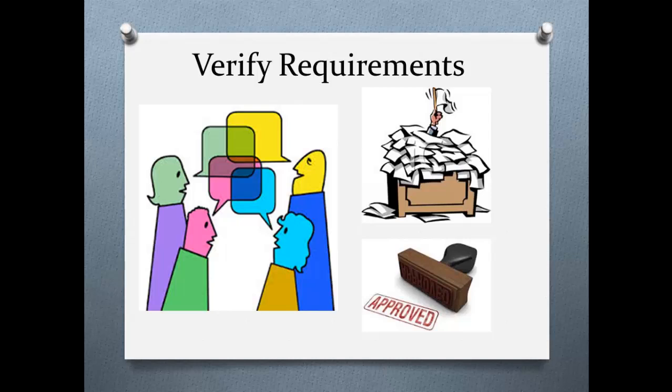After the BRD is designed, the business analyst discusses it with the project manager, PM, and the business. Sometimes, depending on the requirements, an ETL manager, lead or designer, and if database modeling is involved, a data modeler and DBA, might all be involved. They are going to discuss and see if everything is going to work out. Then, with the necessary changes made, they are going to come up with the final business requirements document, the final BRD.